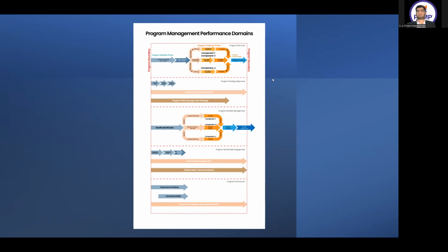And that will get pumped onto the organization's lessons register. Or if there are risks that were identified but we have not responded to or catered for, those uncatered risks we'll again move to the organization risk register. And there are some closure activities in terms of procurement and all that financial stuff that will get closed.